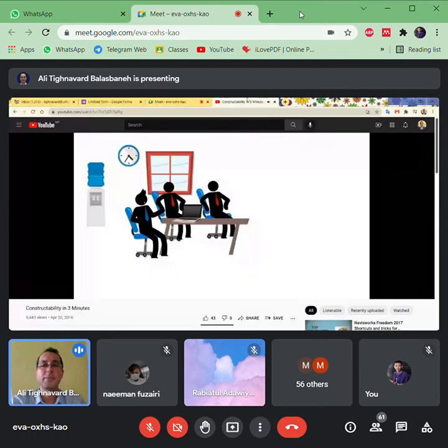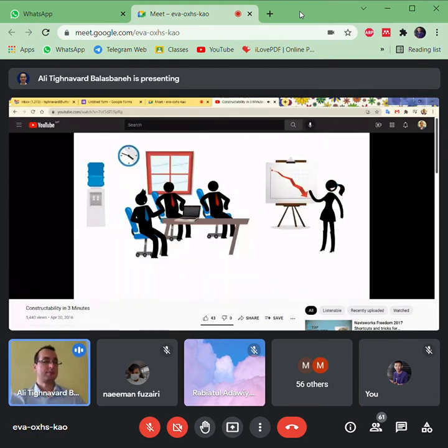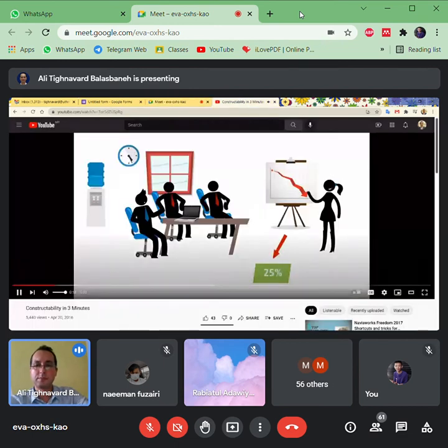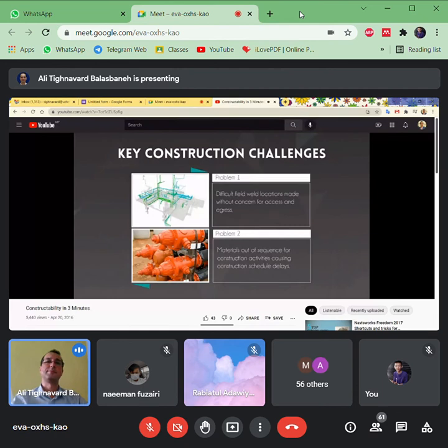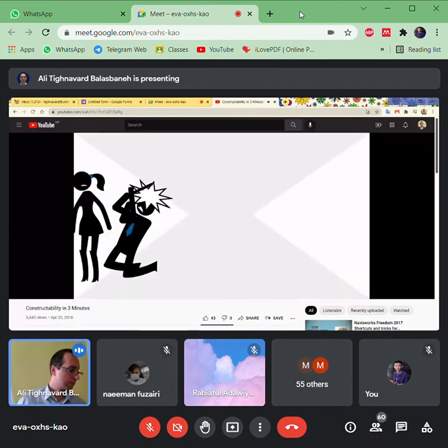Dave's attending a portfolio update meeting this morning and learns that another project that his company is currently struggling with is 25% over budget and is currently 3 months behind schedule. In doing a project root cause analysis into the reasons for such poor performance, it was determined that many of the challenges that construction faced in the field could have been eliminated or mitigated during engineering design.